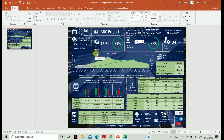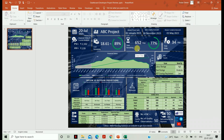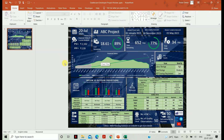Besides the planned and actual values, there is a cost remaining section showing how much cost is remaining and how much cost of work has been completed. Then the next part is your time remaining — the number of days remaining and the percentage of work completed are shown here.